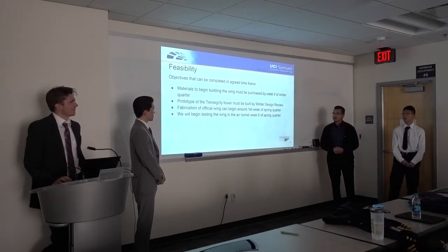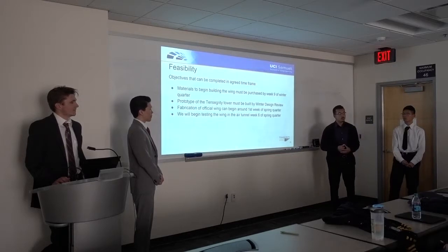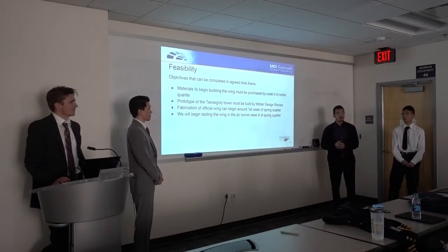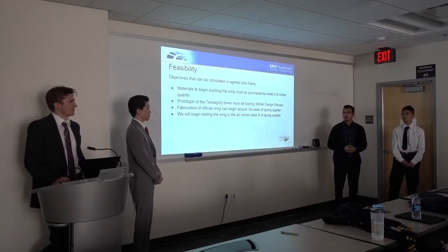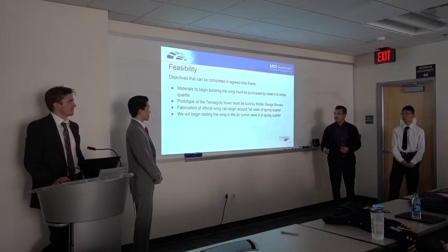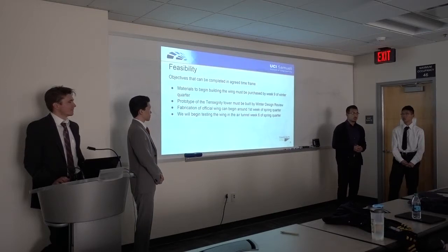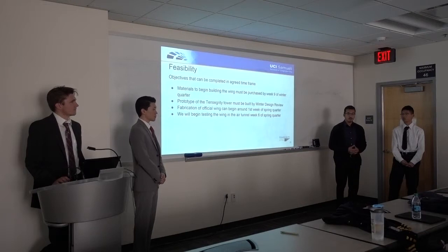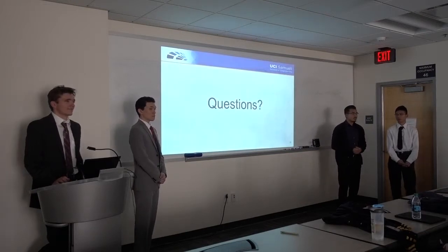In terms of feasibility, we plan to begin purchasing the materials that we would use to build the wing by week 9. We also want a prototype of the Tensegrity Tower built by Winter Design Review, because we want to be able to showcase how our wing will actually morph. We want to begin fabricating our official wing around the first week of 3/4, and begin testing in the air tunnel by week 6 as well. So thank you, and if there are any questions,